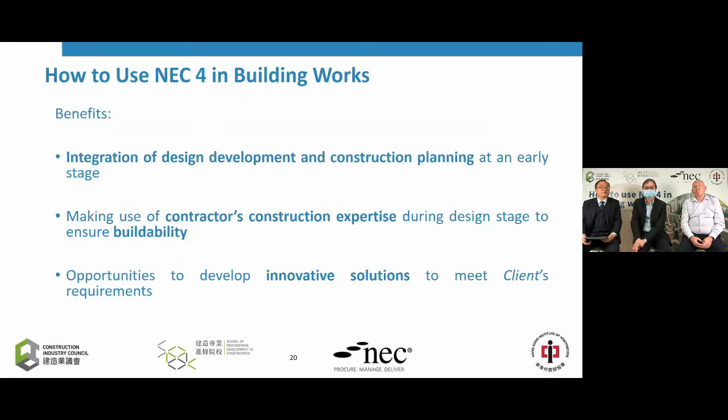Now, according to the official website of the NEC4, what are the benefits of using this ECI? There are six of them. Firstly, the integration of design development and construction planning at an early stage. And secondly, the use of ECI will encourage the use of the contractor's construction expertise during the design stage, such that the buildability of the project will be ensured. So it is unlike the conventional approach, where you have a separate team of designers doing a design, maybe without paying too much regard to whether or not the design outcome will actually be very convenient or practical to build on site.